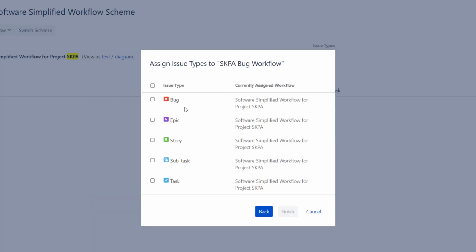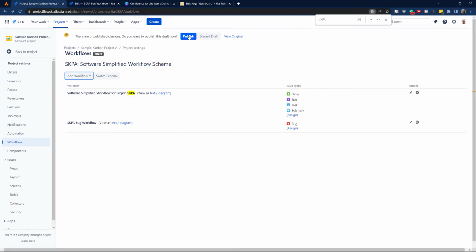And now, a very important step, please do not skip it. Please listen, because there are actually a few extra ways. I do not have that many tickets, but changing workflows also could cause issues. The issues are not super severe. But if we're moving from an existing workflow, which, for instance, has let's assume 10 steps, towards something which is way simpler, of course, Jira is going to ask us to do remapping. And please also be aware that this process is unrevertible.